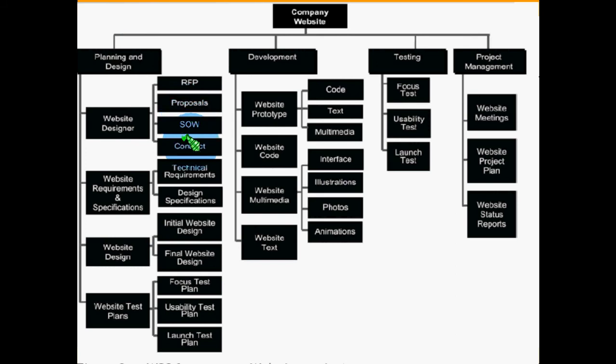One important point to notice is that the items in a WBS are not in any logical sequence. For example, the statement of work should come before the request for proposal, but here it appears later. This is deliberate — a WBS does not show any sequence of work. It just gives you the breakdown of work; it does not give you any sequence.